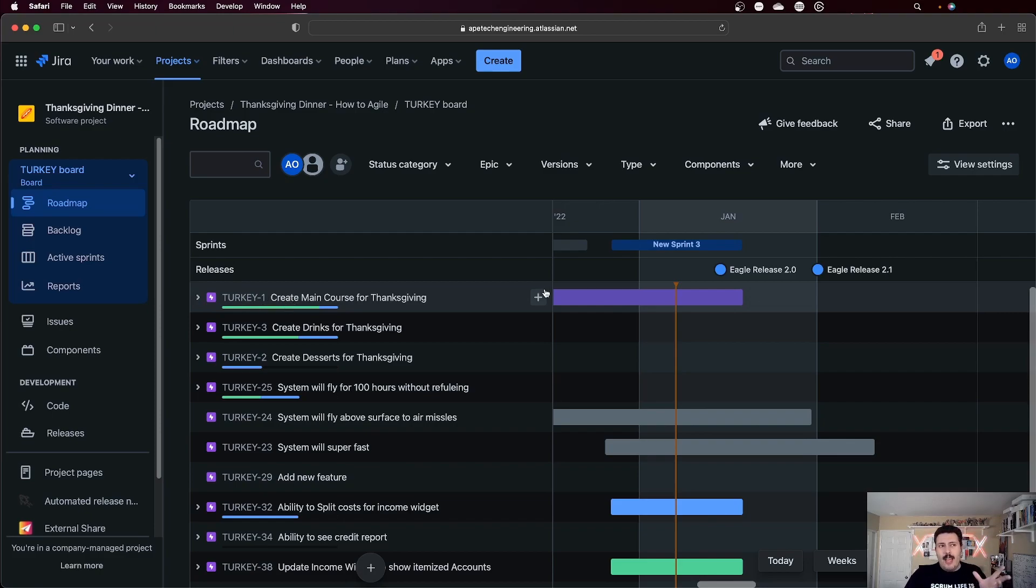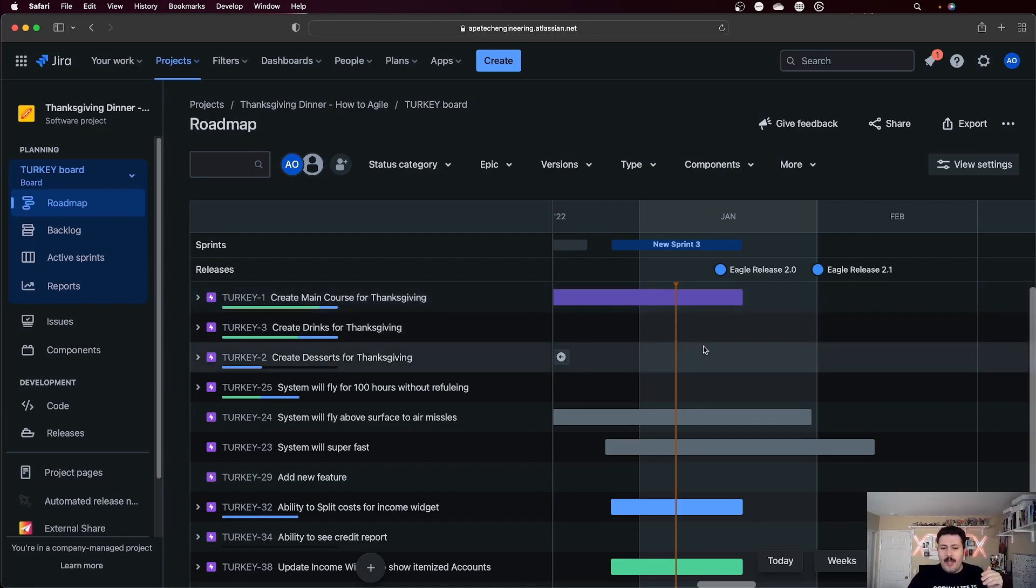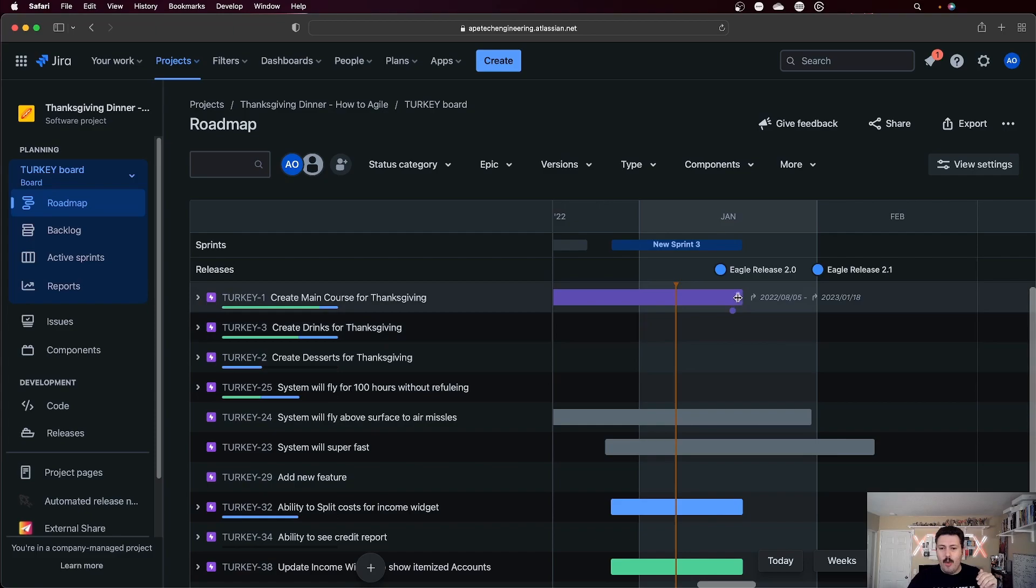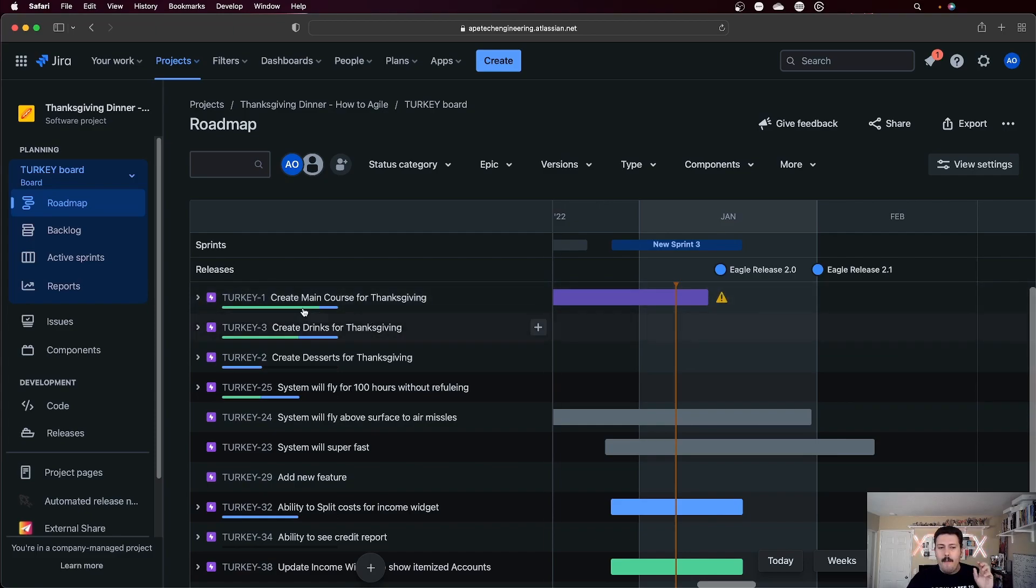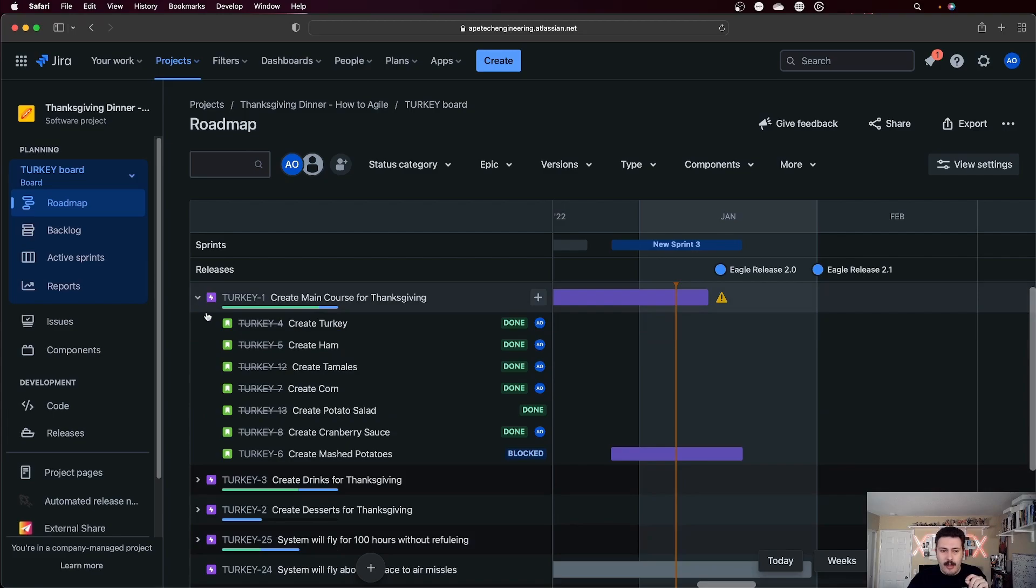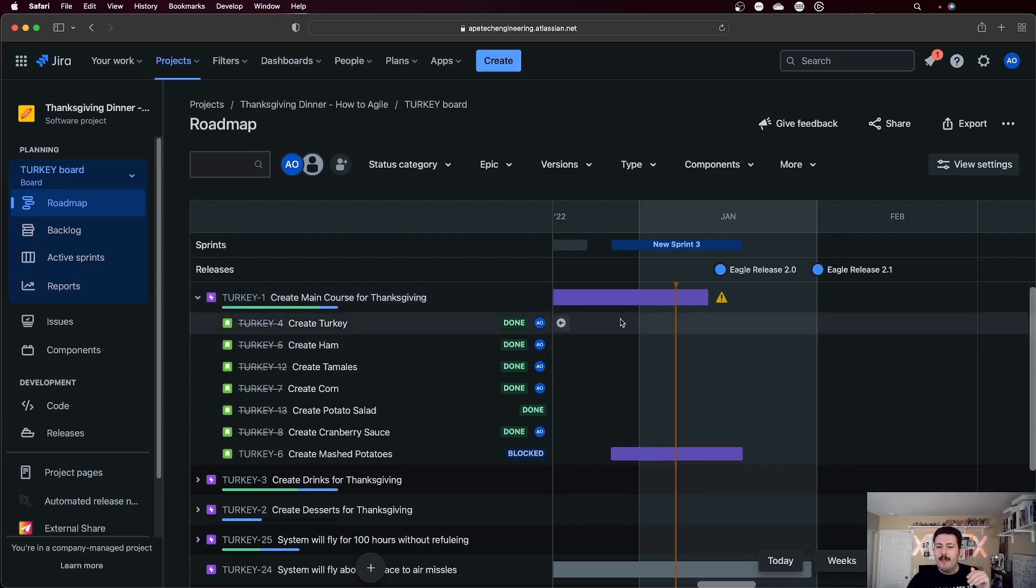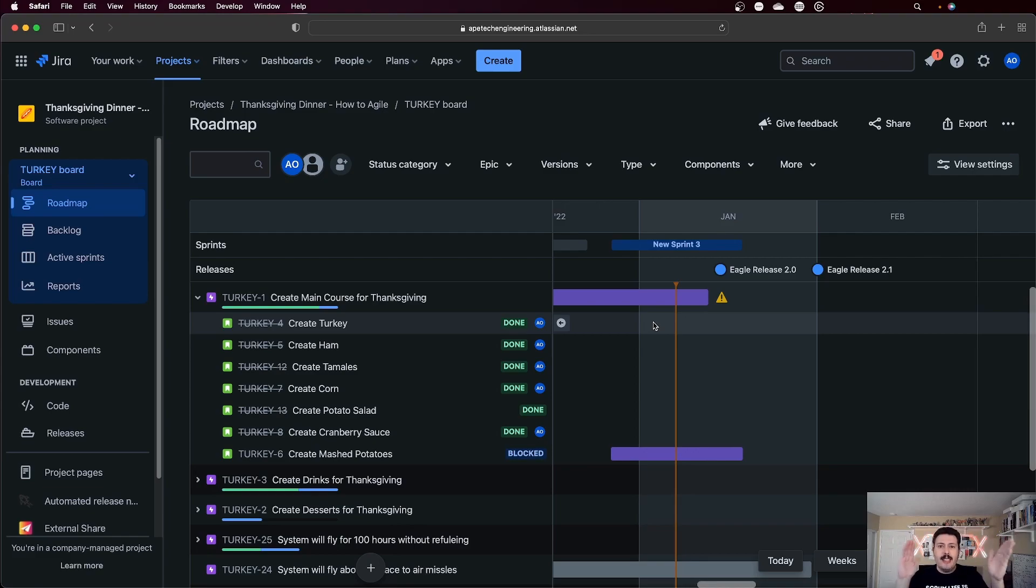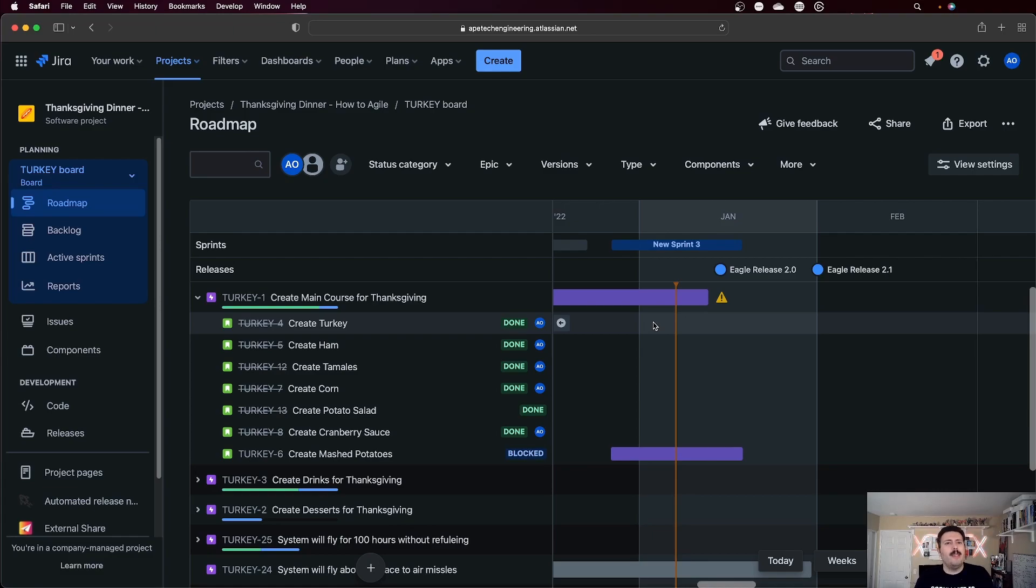Limitation number three is, and this is not going to sound like a limitation at first, but at the epic level, you can set dates. So I can come in here and basically set some dates for my epics. You can see, I can move these things around, but if I try to do it for the stories, for the issues below it, it's just not possible. So that is going to be limitation number three, where you can set dates for your epics, but you're not going to be able to start and end dates for your stories.